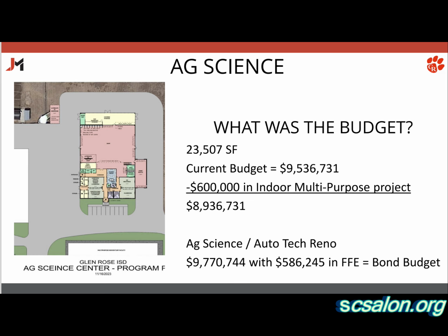So what are we taking action on, or what are we deciding? The recommendation is that we take that number, that 768, to be a guaranteed maximum price for that building. And then you're gonna authorize me to execute the guaranteed maximum price from Tynert in the contract.